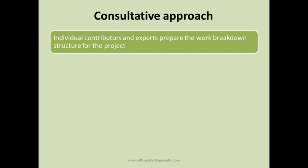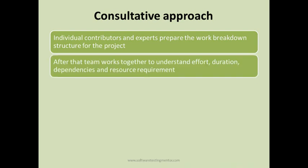In the consultative approach, individual contributors and experts — such as technology experts, business experts, and testers — prepare the Work Breakdown Structure for the project. After the WBS is prepared and all tasks and subtasks are identified, the team works together to understand effort, duration, dependencies, and resource requirements.